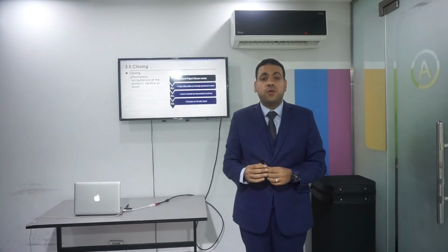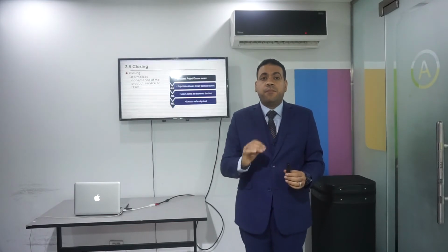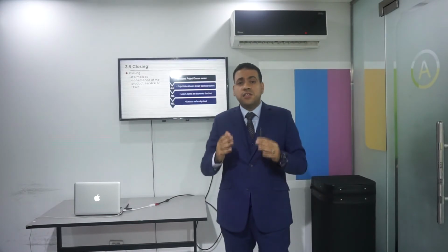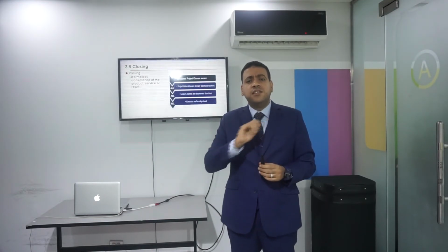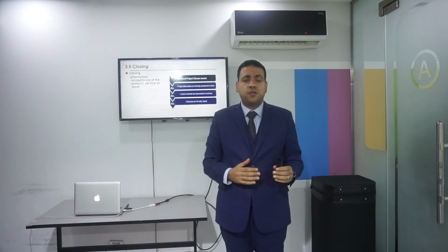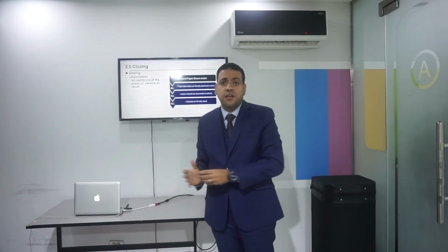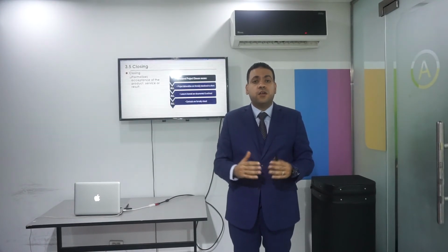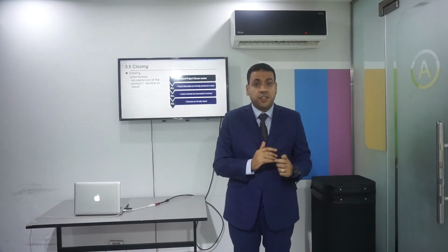Finally, you are going to close your project. You formally close the contract. You open the contract in the initiation phase, and you are going to close it in the closing phase. Document also the lessons learned from the project. So the project manager is going to write down the lessons learned from the project. For example, what has been done right? So he is going to repeat it in the next project. And what has been done wrong? So he is going to avoid it in the next project. So in the closing phase, you formally close the contract. The project manager also has to write down the lessons learned, which is a very important asset in your organization.